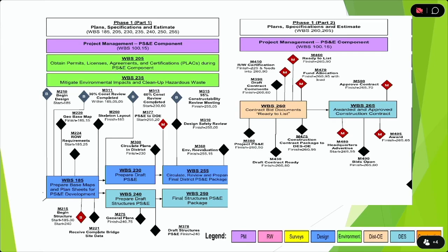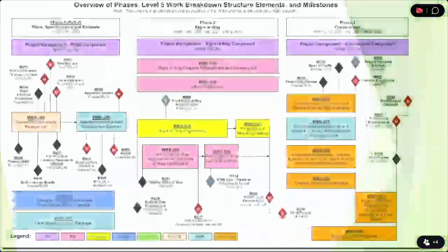Once you advertise the project, depending on the contractor qualifications and the lowest bid, and various other factors, you would award the contract to the appropriate contractor. Once the contract is awarded, the next step is milestone 500. The contractor has typically 2 weeks or 15 days to submit all the required documents to show that he met the requirements for the contract. And then you review them, you approve those. That signifies milestone 500, approving the contract. That means the contractor can start building the physical structure.